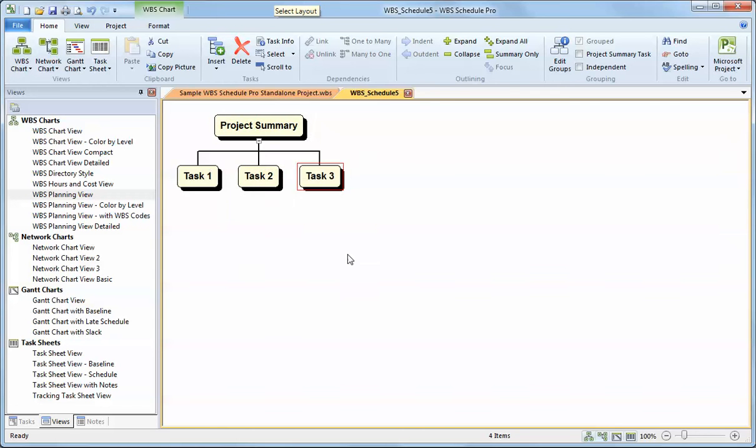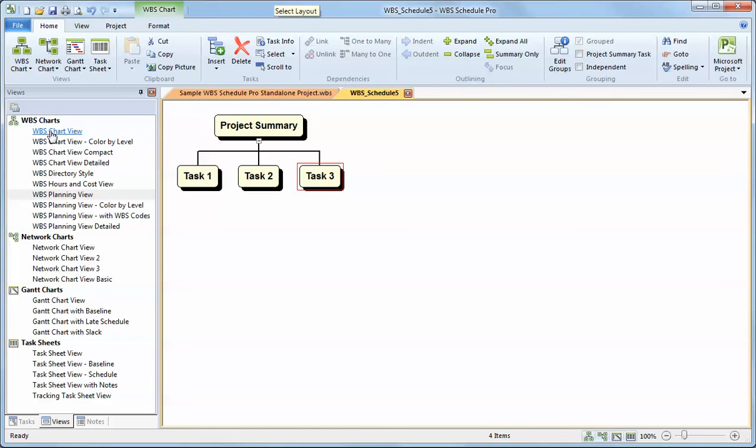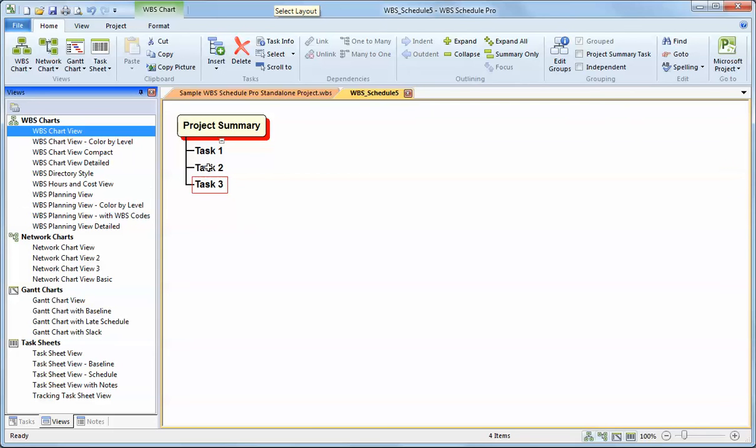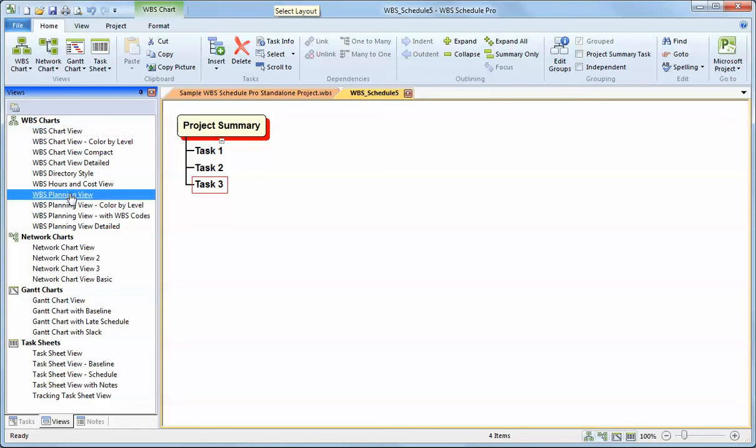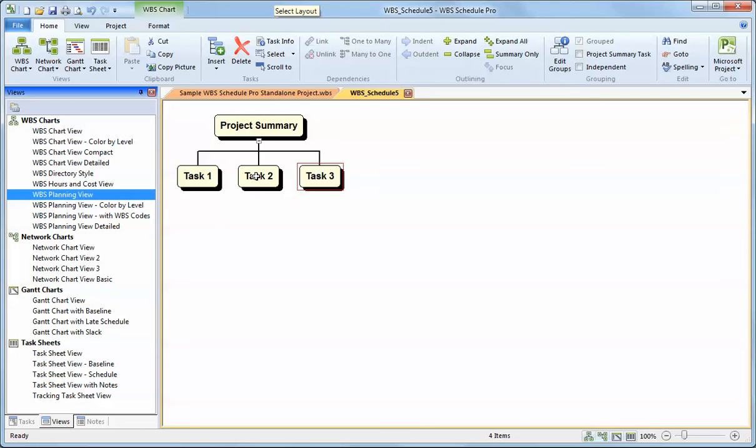That's the proper way to structure a project. Now, there are ways of displaying these tasks that the planning view will display tasks in a left-right fashion underneath its respective summary. But some other views, like the WBS chart view, will display tasks vertically under their respective summary. Task one, task two, task three are still each subordinates to the project summary, but they're just listed vertically. So keep that in mind when planning your projects.